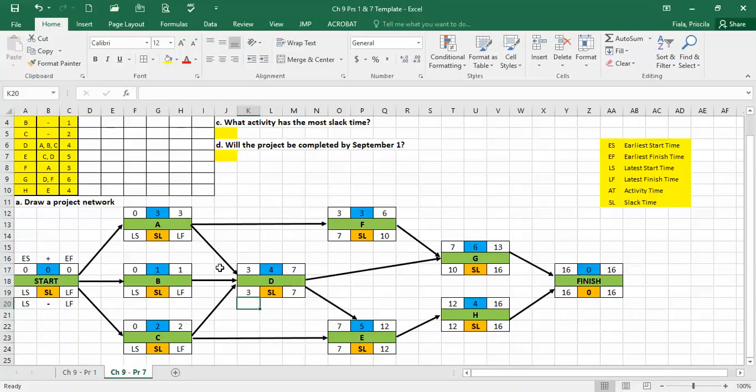Okay, so now do you see the arrows going to this 2 over here? Between 7 and 3, the smallest would be 3. And if you're not sure, again, take the minimum between this cell and this cell right here, which will be 3. So 3 minus 3 right here is going to be 0. Over here, which ones am I missing? Okay, I did all this. Okay, good. So over here you have between 7 and 3, therefore you're also going to have 3. So 3 minus 2 is 1, correct?